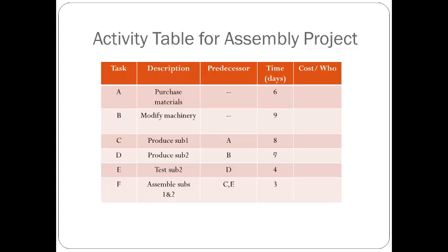And after node 2, we have C, which has A as its predecessor. So C is 8 days. Okay. And then D, which has a predecessor being B. So we'll go from here. D has 7 days. Okay. Then after we finish everyone, first we'll just connect them like this, and we identify whether we need to just use 1 node to represent both.